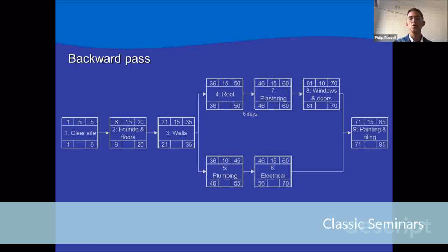Now, to check that your calculation is correct, what you need to do is exclude the part where the chain splits. Look at everything on the left and right, and the early start and the late start must be identical. Early start must equal late start, early finish must equal late finish. So that works pretty well.